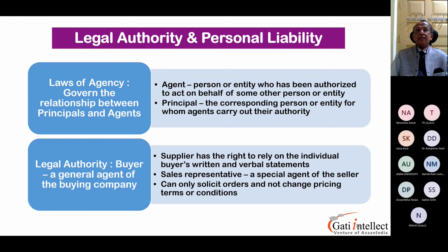Now, what you have to understand is, I'm just deviating a little bit on the subject. When your customer comes to you with a claim letter in black and white about an issue, you have to sign it and give it back to the customer because he would insist on it. Now some people will say, no, we don't sign. You are free to sign, provided you put the remark, accepted without prejudice. Accepted without prejudice. Number one.